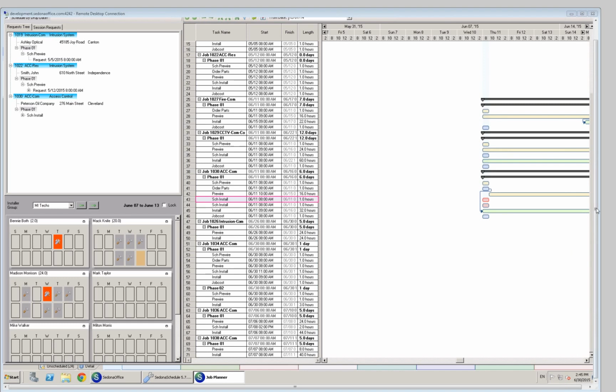I have a question here. If you make a change in the task setup, does that update for all future tasks of that type or just that one? I'm thinking what they're saying is, if I modify this in the setup, where we can define the number of hours and so on, does it modify things going forward? It does not. It's only a default to create more job types, and then the job types create more jobs. The only thing that drives the Gantt displays and the information there is what's on the job itself. You would have to go into that job itself and change the hours for that. It's not retroactive. It doesn't update all of your data according to the latest change. It's just for new jobs. This is what it's going to use.